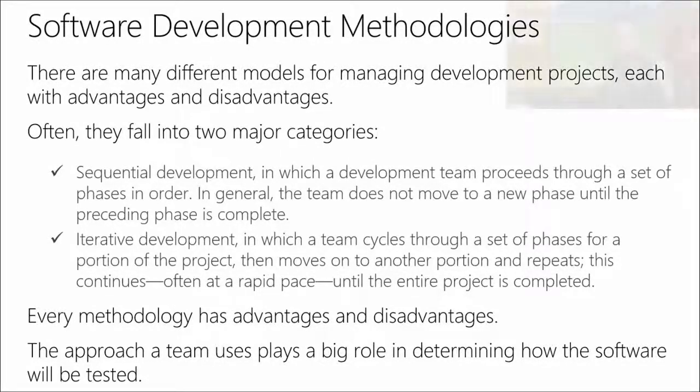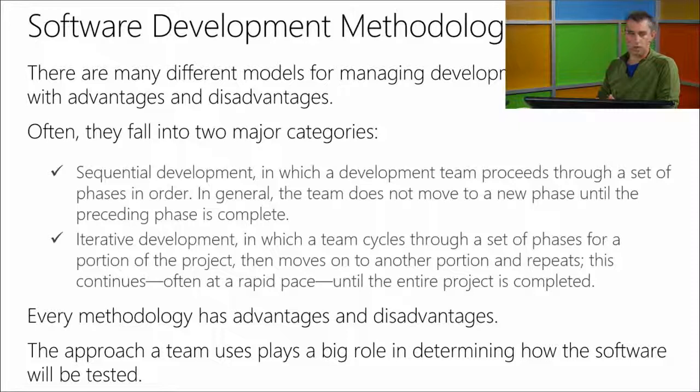Sure. We'll start off with the waterfall methodology, which is a sequential methodology, meaning there are phases, and between the phases there's something referred to as phase gates. If you've got the envisioning phase, which is the very beginning, your business is 100% involved, your program management's 100% involved. If you're the test lead on the project, you're involved.